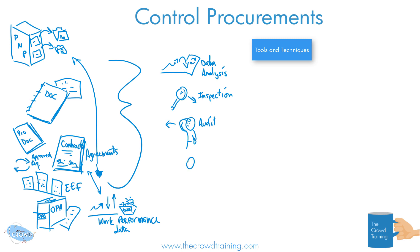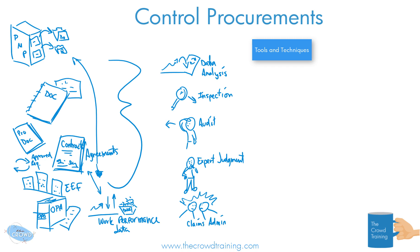We also use our expertise and knowledge — whether that's coming from subject matter experts like procurement managers or those with experience. So that's expert judgment. And sometimes there are going to be disagreements about what's going on in the contract and agreements and procurements, so there will be times where we have to do some claims administration to look at how things are going and try to figure things out in that fashion. Those are the tools and techniques.